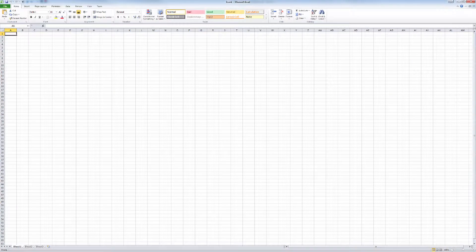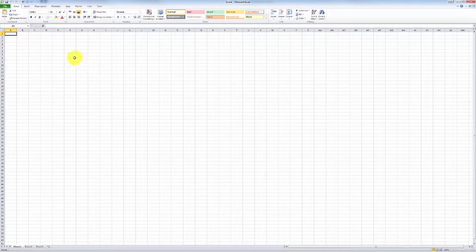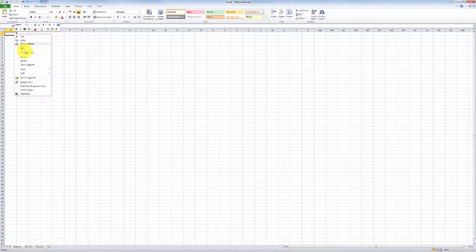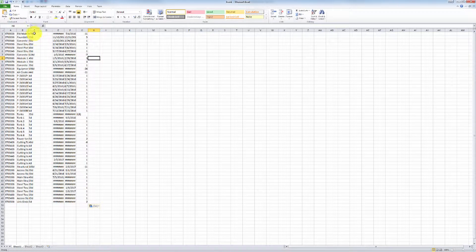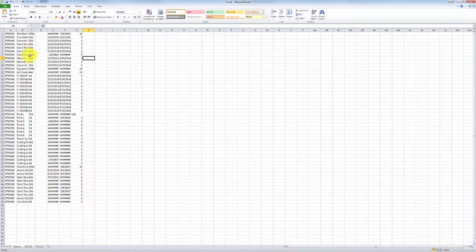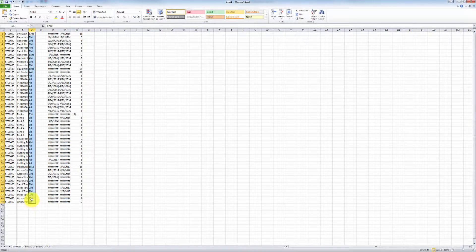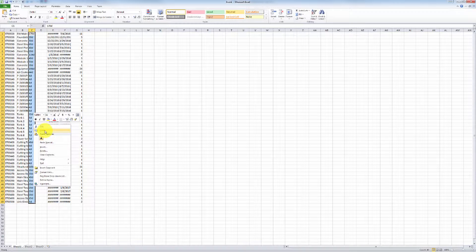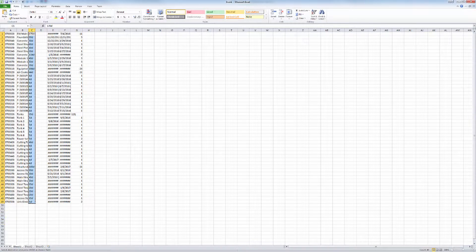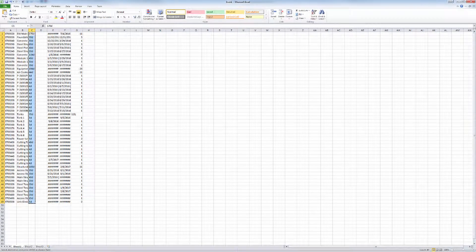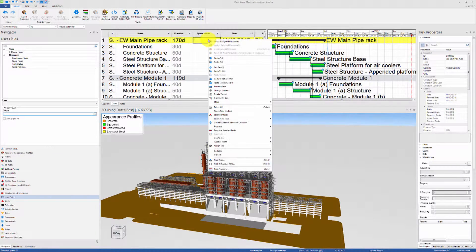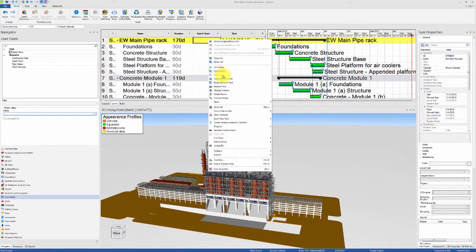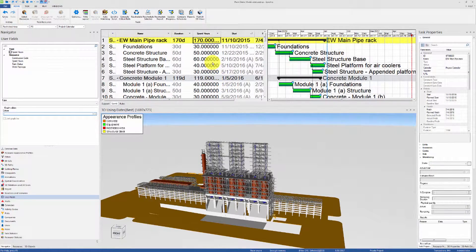We can paste all of what we copied into Microsoft Excel and then select all of the elements in the durations list and then copy that back into Synchro in the spent hours column. Make sure to click paste tasks as text.